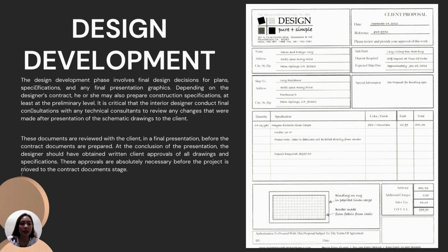Third is the design development. So the design development phase involves the final design. This is the final design decisions for plans, specifications, and any final presentation graphics. Depending on the designer's contract, he or she may also prepare construction specifications, at least at the preliminary level.